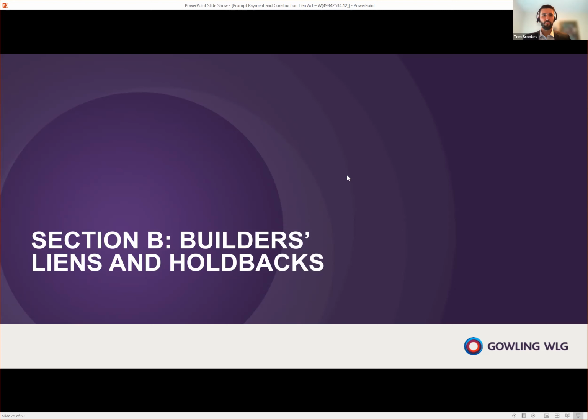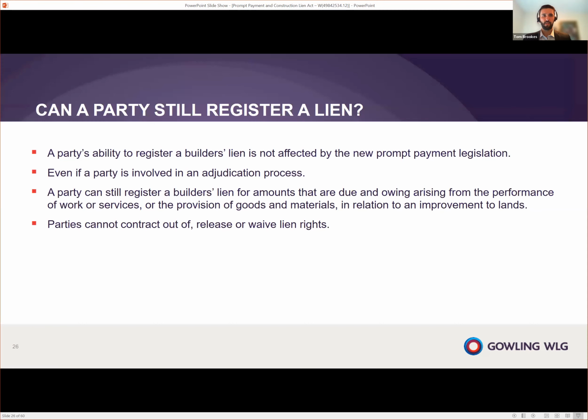Thanks so much. So I'm going to discuss builder's liens. First question, can we still register builder's liens? The answer is yes. Your ability to register a builder's lien is not affected by the new prompt payment legislation. You can still register a builder's lien whenever you have performed work for which you have not yet been paid. And that applies even if you are presently within an adjudication process. And as with the current legislation, parties still cannot contract out of or release or waive their builder's lien rights.